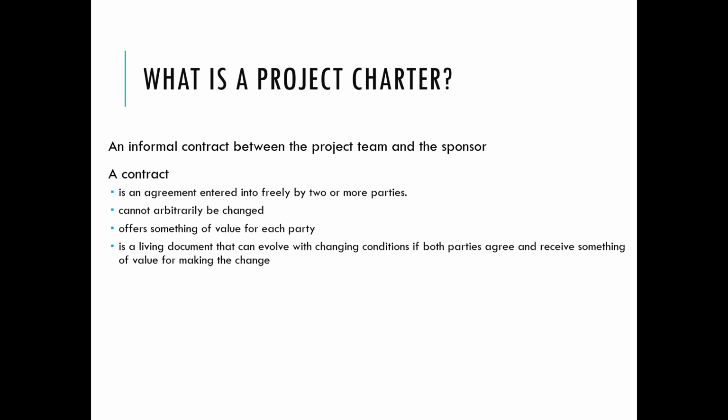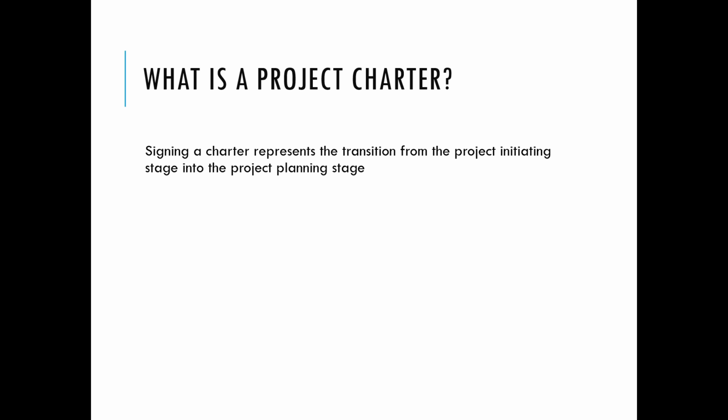A project charter is an informal contract between the project team and the sponsor. A contract between two or more parties entered freely into. There shouldn't be a pressure. And a contract cannot arbitrarily be changed. A contract offers something of value for each party, and it's a living document that can evolve with changing conditions, if both parties agree and receive something of value for making the change. Signing of a project charter represents the transition from the project initiation stage to the project planning stage.